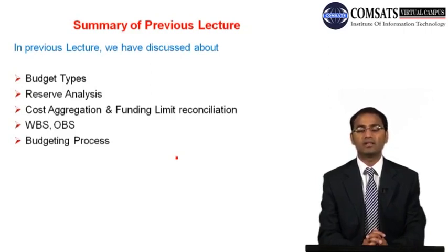So we will consider the cost risks only, or the risks which ultimately lead towards the cost part of project management. What if there is an issue of time, and a time increase in the schedule? For that we also carry out reserve analysis, but that is not part of cost management. So we will be talking about only cost risk.